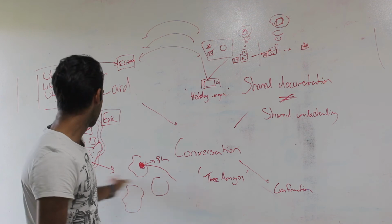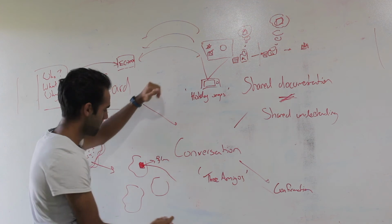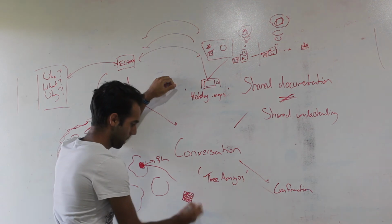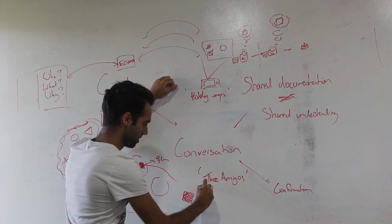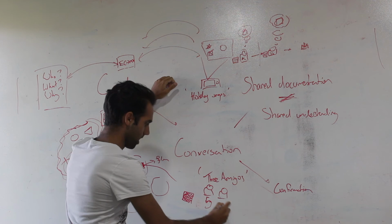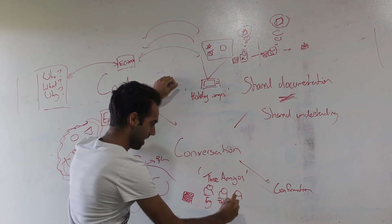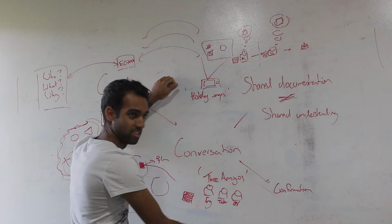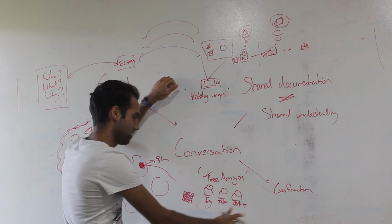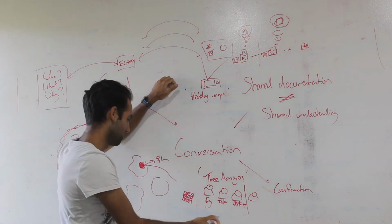I got the rocks, but I didn't really get the three amigos. He says, as a product manager or a designer, you've got your gems. Here's your gem. And what he says is, you get your three amigos together. So they're your lead engineer, probably a tester, really important, and maybe a BA or someone, in our company financial intelligence, a domain expert, someone who really understands the domain. And if you think about it, I think a product manager should be a friend as well, but maybe we're not part of the three amigos. I don't know whether we're part of them or not. Who knows?